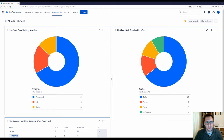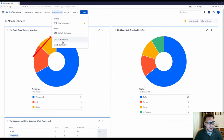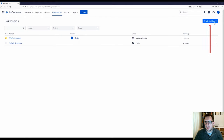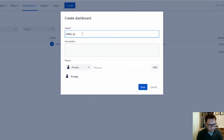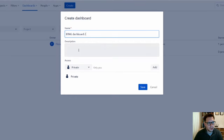The first thing you'll want to do is go to Dashboards and Create Dashboard. You can either do it there or go to View All Dashboards and click Create Dashboard in the top corner. Once you click that, it will ask you to give the dashboard a name. I'll call this BTNG Dashboard Two, because I've already got another one of that same name, and I'll aim to replicate what we've got on the other one.